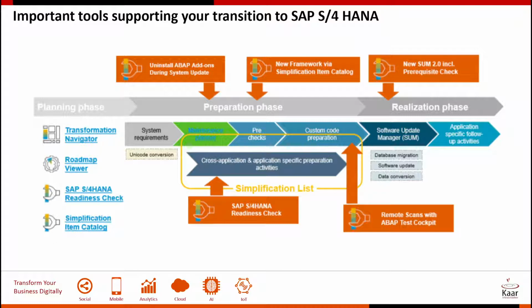The tools that are used in the discovery or the assessment phase are primarily the maintenance planner, the SAP readiness check, the SAP transformation navigator, the SAP Fiori apps recommendation report, and also in addition to these, the workshops that you would do with the IT SMEs to help understand the current ECC process and make the process mapping. Also, studying the usage of the system helps identify the business scenario that have to be included in the test cycles.